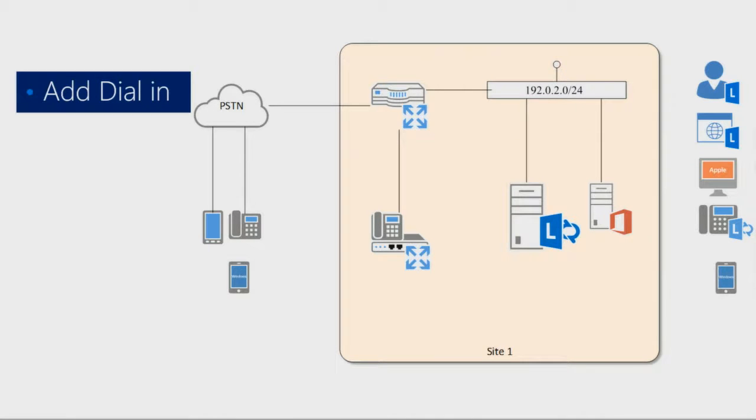So that gateway piece, I think, needs to be considered way before you even deploy the first server. It can take time to get them off the supplier market. It might take time, in the case of AudioCodes, 2 to 3 weeks to get the remote deployment assistance built up. It just takes time. And every time we start slipping the schedule, we start looking less successful. So if we think about it ahead of time, we can set expectations and then meet expectations.